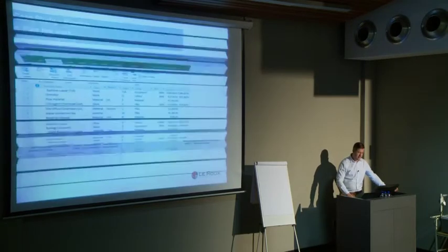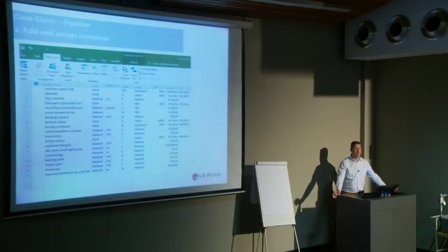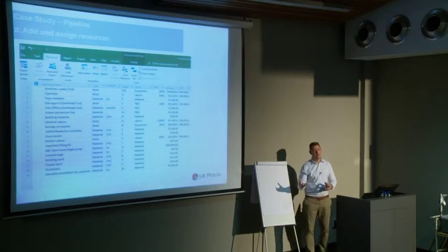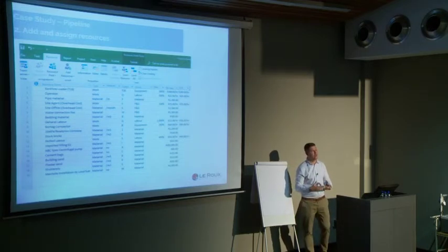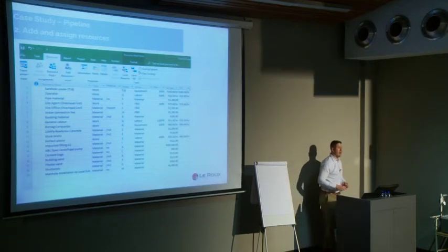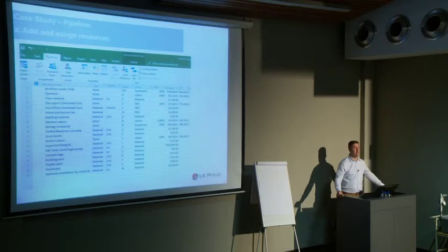Second step, created my resources. Why? Because that is the key that integrates effort, man hours with cost over time. It's as simple as that. In this instance, I've got slightly more complex resources, can you see? It's not only the work resources in terms of